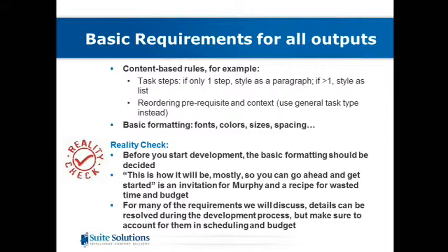Another one of our reality checks. Before you start development, the basic formatting should already be decided. I know that it has come across once in a while where a customer has said, okay, well, this is how we think it's going to be. It's pretty much like this, and we might change a couple of things. If that happens, as we have written, it's an invitation for Murphy and Murphy's Law, and it's a recipe for wasted time and budget. It's going to be very frustrating for you if suddenly we say, hey, listen, we have to now redo a lot of this development because this is how we thought it was going to be according to the previous set of requirements.